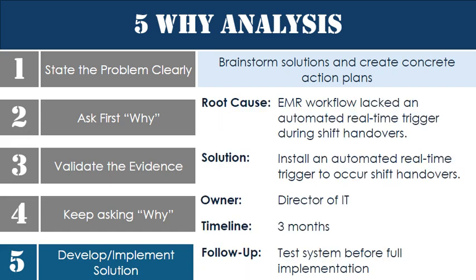Example for the app delay. Root cause: no electronic medical record automated real-time trigger during shift handovers. Solution: install an automated real-time trigger to occur at shift handovers. Owner: Director of IT. Timeline: within the next 3 months. Follow-up: test the system before full implementation. It should be noted, in this example, an interim immediate action will need to be put in place before the full corrective action is implemented.